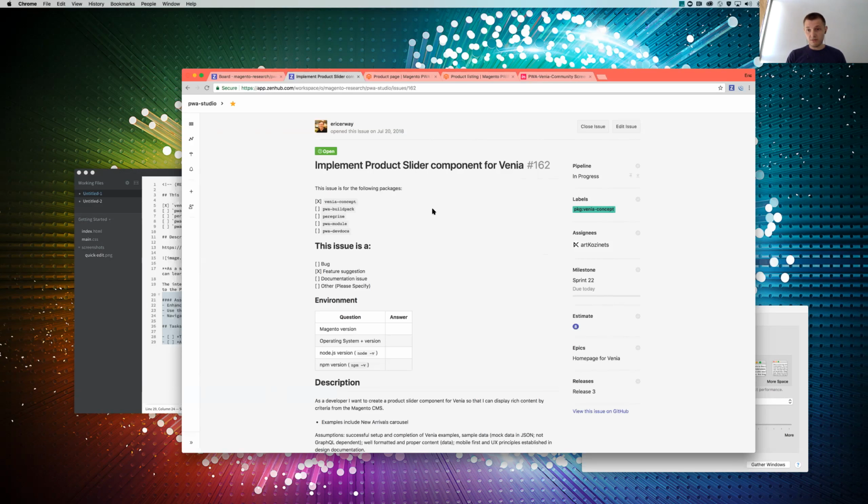So you're right. The way to do that in our sort of agile backlog management style would be to first implement something that is specific just for speed's sake and for quickness of implementation, that is specific to one look and feel and one type of data fetch. And then the second implementation for the new data or a new visual look would take that original code and then refactor it to be reconfigurable. And that's what I think ought to be done. If there's already a lot of configuration in there, it'll probably still need some more. So take that component that has some hard-coded aspects and then add a configuration point to it instead with a sensible default.